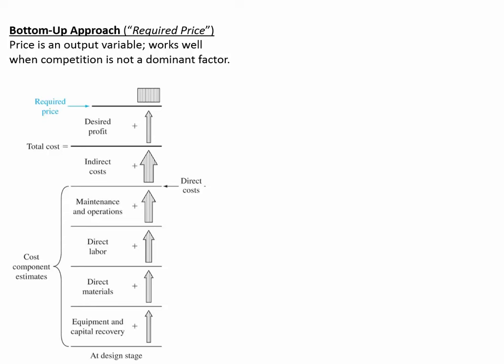So here in this bottom-up approach, you can know the expense of the materials that are used for production. You can factor in the cost of the labor, which is the assembly, the labor required for packaging it, the labor required for shipping and marketing and so on. Expenses for maintaining equipment and operational expenses like the supervisory salaries. And then the indirect costs.